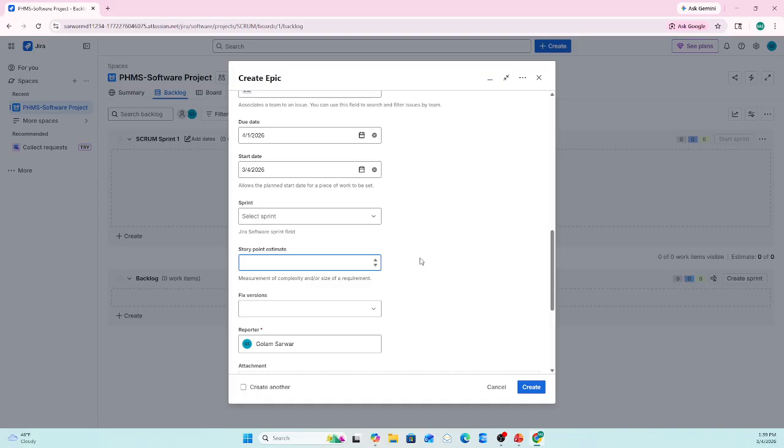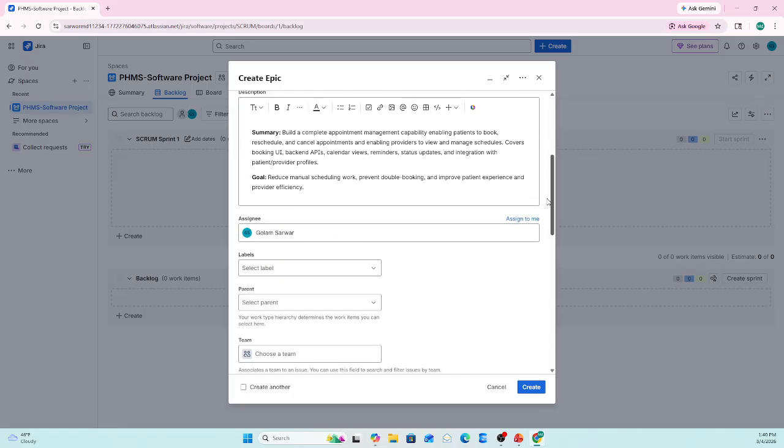It's based on the complexity of the tasks, effort, risks, or any uncertainty, and also team size, experience, and the focus time. Those things are combined to determine the story point. Here we will do 20 story points, because as you see, we have a lot of tasks here.